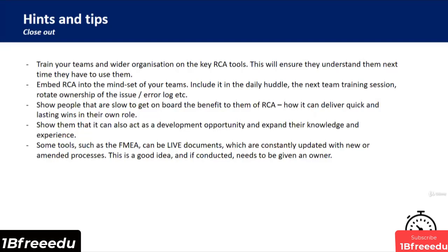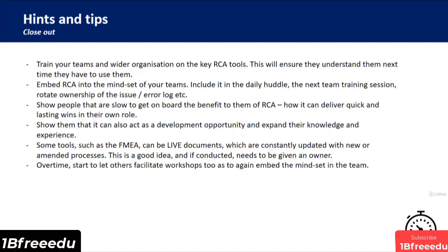Some tools, such as the FMEA, can be live documents, which are constantly updated with new or amended processes. And this is actually a really good idea. And if it's conducted, make sure to give this an owner. Someone should be owning this piece, as they should be owning the tools, the plans, the approach. There should always be an owner.